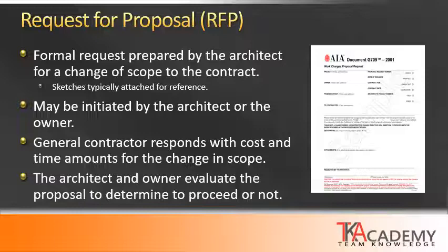An RFP change can be initiated by the architect or by the owner. When it's initiated by the architect, a lot of times it is for some correction or some change that needs to be made that they know is going to involve cost. This could be something that is coming from the plan review from the authority having jurisdiction, and the architect needs to make a change based upon that request.